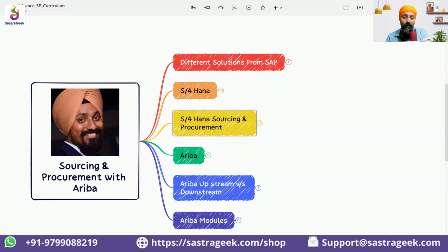When you have a single vendor, and wheels are the critical components with specific dimensions which need to be used, then it's not a strategic sourcing. Strategic sourcing would be that you have more than one supplier, and that also in different regions. If one is in Karnataka, the other can be in Maharashtra. If something happens due to some political or other issues between Tamil Nadu and Karnataka, and the factory got stopped, you have another source from where the material can come up. Maybe you have also developed an international source. That is called the strategic sourcing.